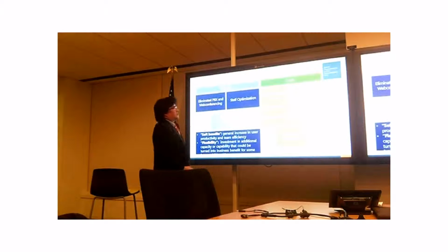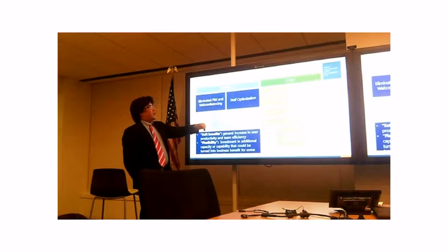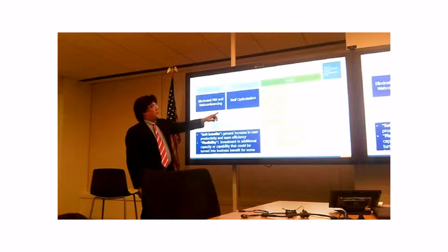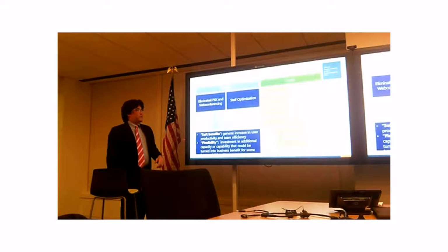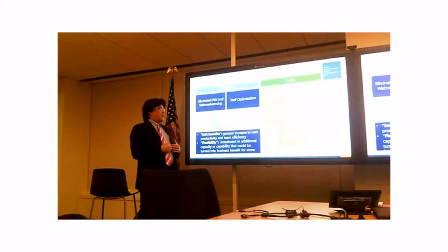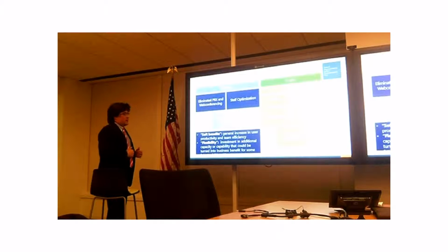The costs. So the cost areas here are implementation, labor, professional costs, hardware costs, software license costs, and additional bandwidth. Because remember, we're going to Link, and we want to be able to have that voice capability. So we want additional bandwidth to make sure that we are reaching the highest requirement levels there.